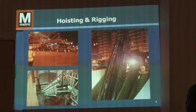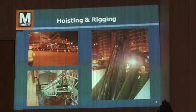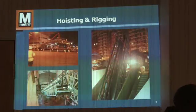On average, it's about anywhere from 20 to 40 feet. So coming off the street, lowering it in, and as you saw through that tunnel area, that was where it would be staged. If we didn't get it to a point before opening, we would have to leave it there in that section. The goal is always to get the truss down into the station and park it. So the next night, they'll come in, hoist it, move it into place, and then start to lower it down the wellway. It's a pretty deep wellway.